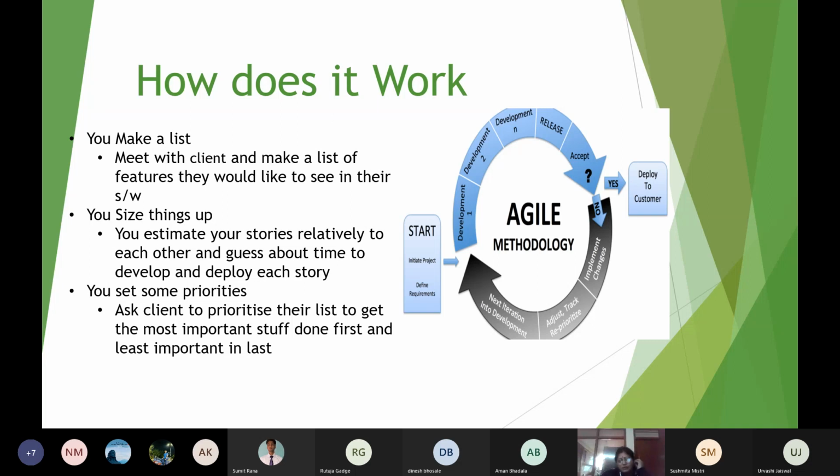So this is a particular user story. Now, a user story has different ways to write it, which we are going to study in detail later. I just gave an example of what kind of user story can be there. Suppose I am a vice president of a company and I want a sales report every day. So as a user, I can say that I want to have a daily sales report on my laptop, so that I can identify how much sales is being done in different areas of the country. So this is my story.